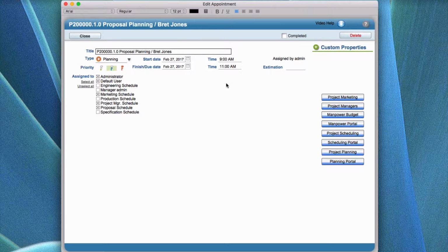Okay, so I'm going to explain: when you open a new calendar and you're going to put in an event, you put in the project and then the extension for the schedule number. You put in whatever the schedule number is supposed to be for, and then the particular employee that you're going to use. If this was a vendor, you could put another thing in there. If there were vendors, and this is the guy that's responsible for something, you could put the vendor name in there as well. There's plenty of room.